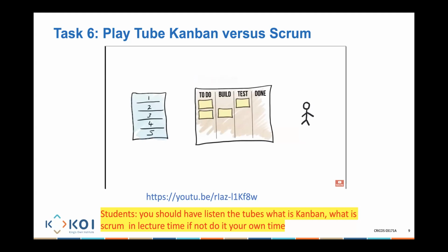Each day during the sprint, there's a Scrum meeting. It's a stand-up meeting where the team takes a maximum of 15 minutes to discuss progress and to identify any blockers. At the end of the sprint, the work completed during the sprint is packaged for release. Any incomplete items are returned to the product backlog.